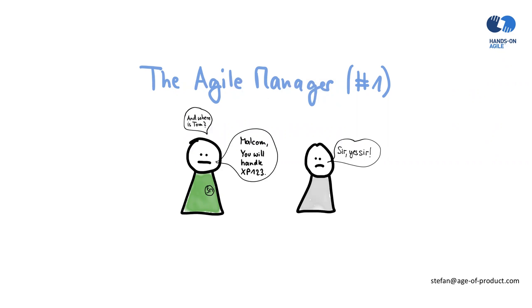I believe self-organization does not mean the absence of management. I mean, why would a Scrum team handle payroll, for example? Outsourcing of these kinds of tasks to the management is common. If you'd like to learn more about this, I highly recommend that you run, for example, a delegation poker game from the Management 3.0 series, which is really helpful and provides a lot of insight into how your team is actually understanding the role of management. However, Scrum is by all means not about exercising command and control. The Scrum Master is by definition certainly not a supervisor. If you search the Scrum Guide, you will never find project manager or something in that direction. It simply does not exist.